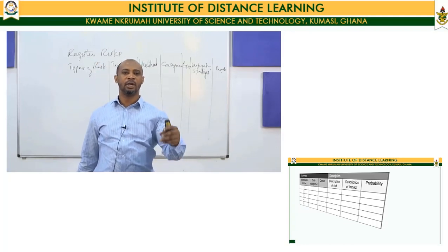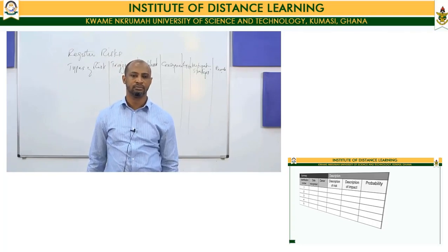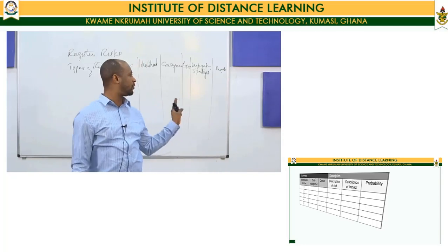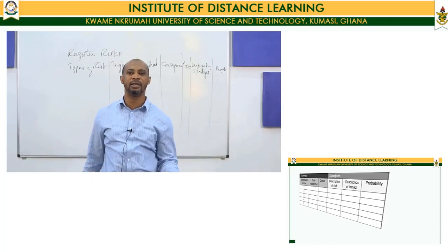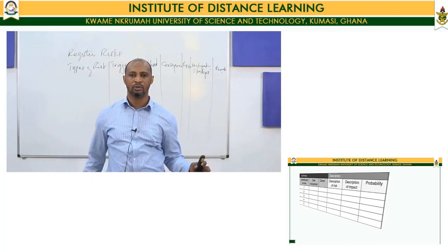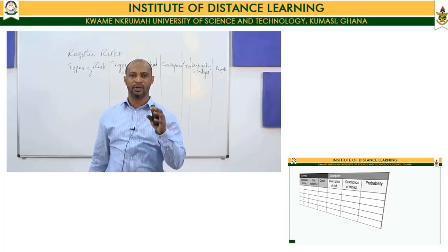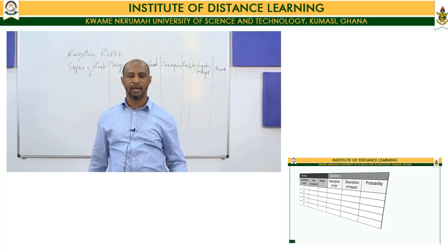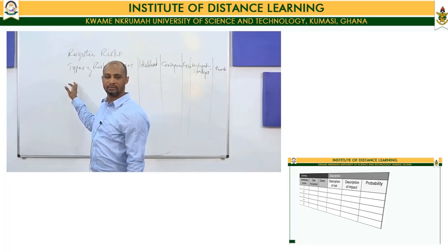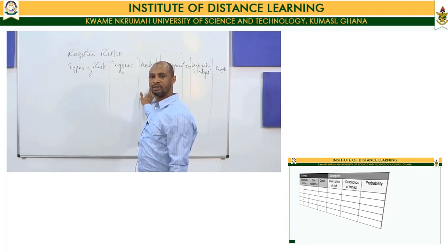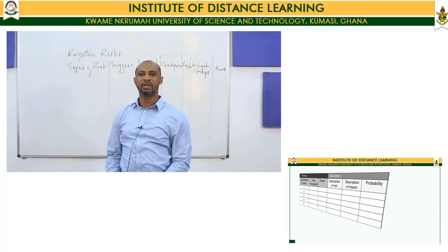This one describes a two-side register that has a summary and a description. Yours can be very different. The one I have on the board is very different from this. They are all forms of risk registers, and there is no right or wrong one. The needs of your organization should normally dictate the kind of register you want to keep and what comes in the heading. Except that for the basic, everybody should be able to know the kind of risk, the likelihood, the consequence. What priority are you giving it? What is the mitigation strategy?